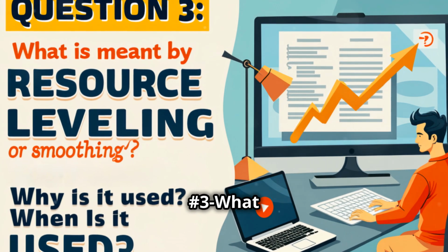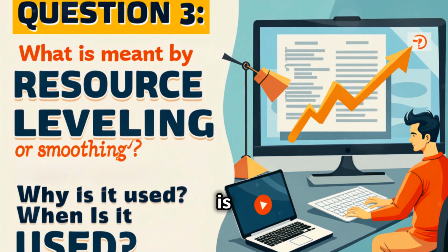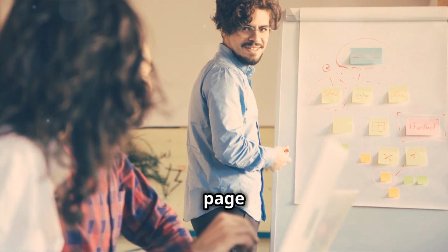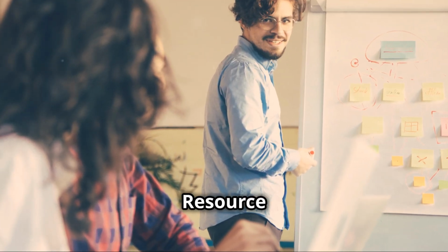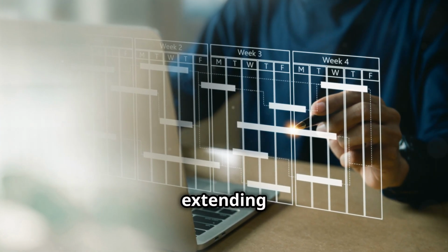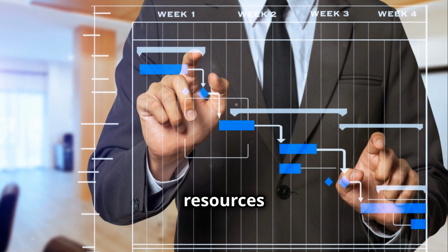Question number 3, what is meant by resource leveling or smoothing? Why is it used? When is it used? Take a look at page 220 of our text. Resource leveling helps balance resource demand without extending the project completion time, ensuring a steady allocation of resources across the timeline.